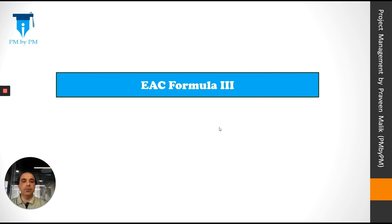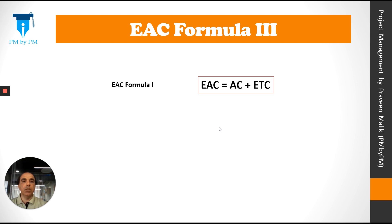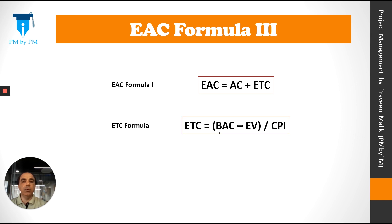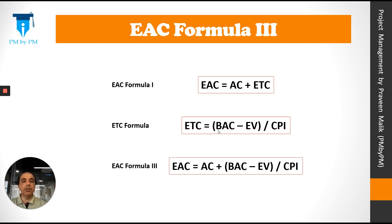Let's look at another formula. EAC Formula 1 was EAC = AC + ETC. From the ETC video, we know that ETC = (BAC − EV) / CPI. Replacing ETC in the EAC formula, EAC Formula 3 becomes: EAC = AC + (BAC − EV) / CPI.